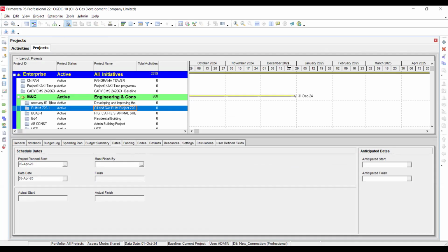If you implement this constraint, that my project should be finished by this date, then every path which meets this date would automatically be labeled as critical path, right?